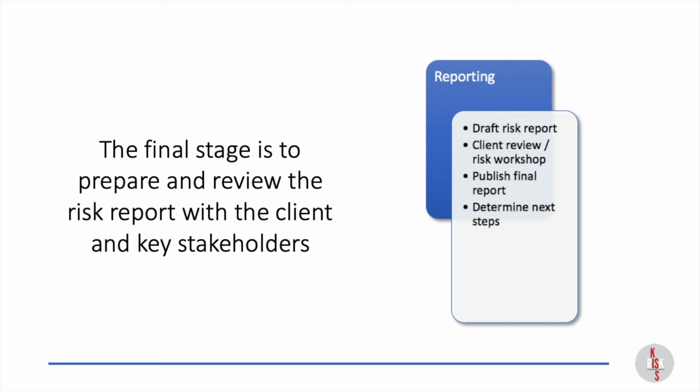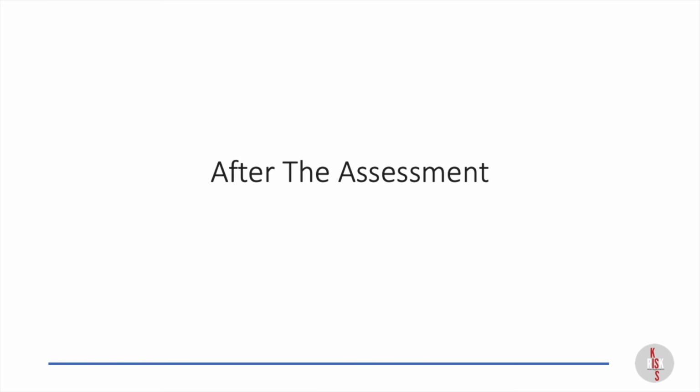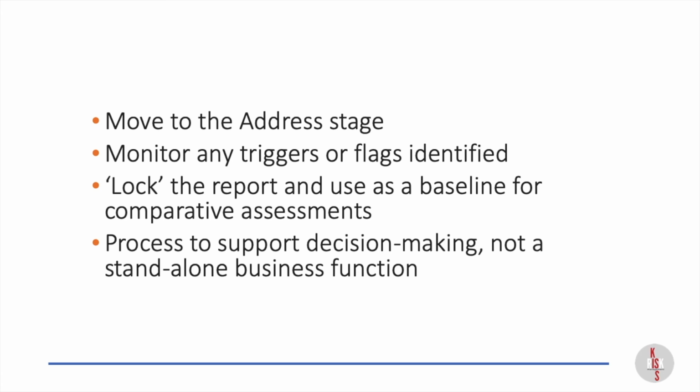And the final stage is that you determine the next steps. You may have answered the question for decision makers, in which case your assessment is over and there's no follow-up. Or the assessment might be a benchmark assessment that you're going to create a bunch of different mitigation measures for, because you now want to do a lot of risk treatment and address your risks. The next steps at this stage will be determining what you want to do with the report. So what comes next? You move to the address stage, which I talked about a moment ago. You're going to address those risks. You may monitor triggers and flags you've identified. You may have said, if event X were to happen, this would cause significant risk.